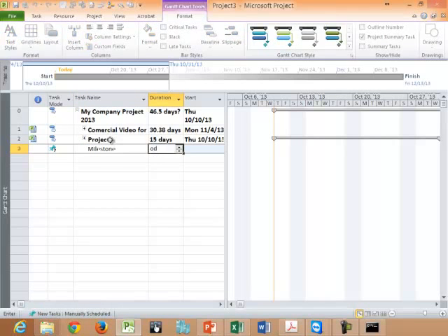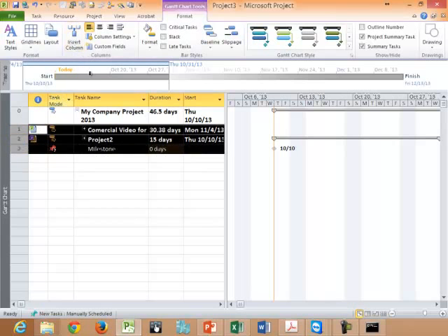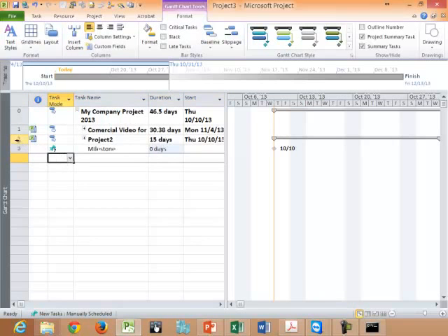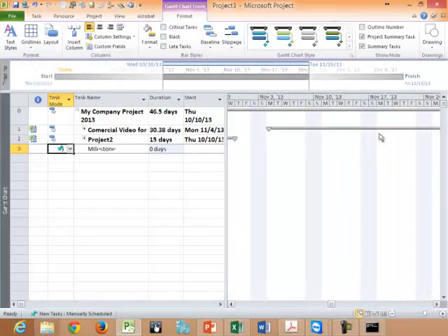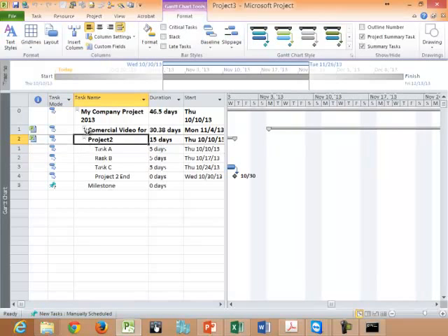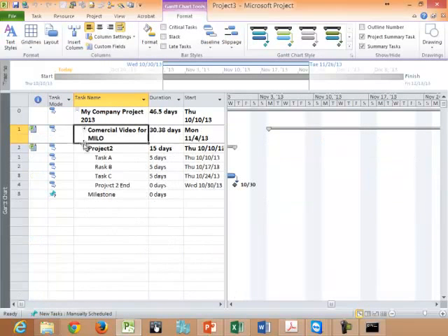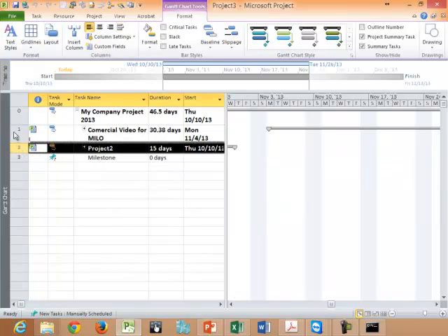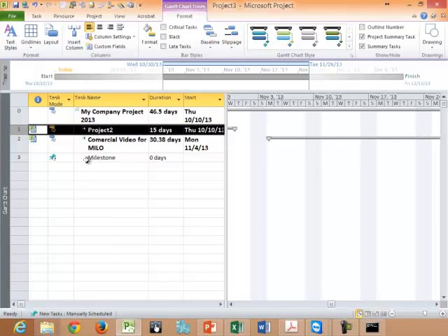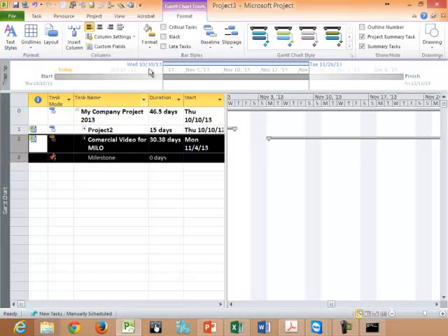Okay, 0D. Okay, so the whole project will finish. Right, so this thing will be the last one here. Right, so you can put it, but the thing is, which one after which? Okay, project 2 comes first, then project this one, and then you can expand some more. Okay, you can see from here everything, but if this one is supposed to be in front on top, you can put this one on top. Right? You can rearrange. Okay, it means after this one finishes, then your project finishes.